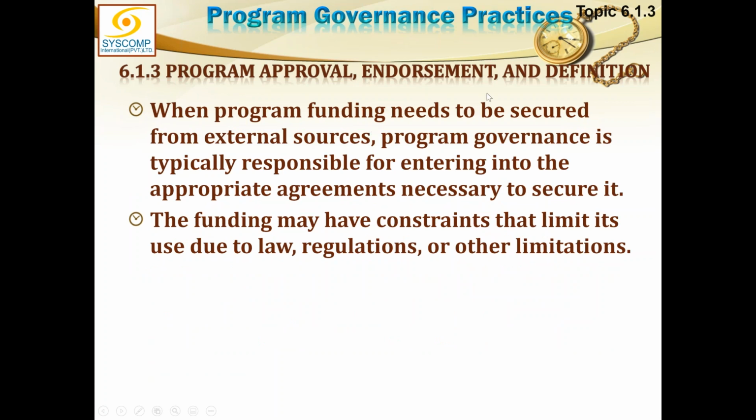When program funding needs to be secured from external sources, program governance is typically responsible for entering into the appropriate agreements necessary to secure it. So this is not the program manager's job or his responsibility.